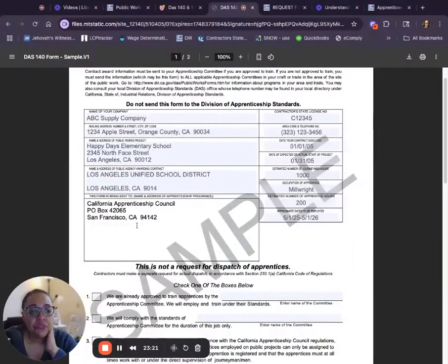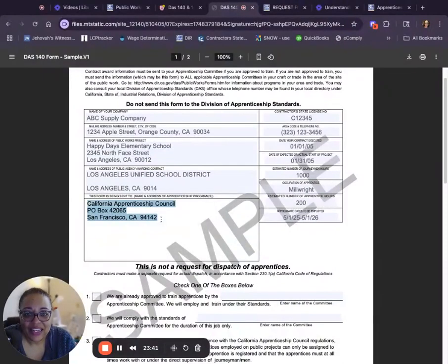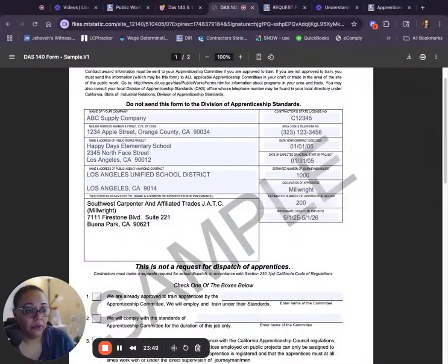So if you're sending to 3 different committees, you must make 3 individual forms. I have in the past, before I knew better, I would be like, oh, I'm going to send it here and here. Then don't put that one on this form. Send it here and send a new form that you send here. So that's something to remember. You have to have one form per committee.